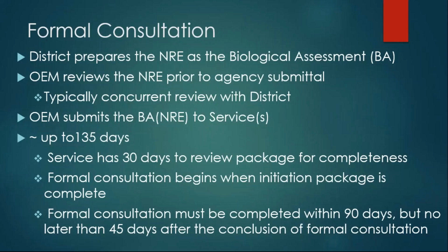OEM also reviews the NRE prior to agency submittal, and then OEM submits the biological assessment, or in DOT language, the NRE, to the services. The services then have up to 135 days to make their final decision, and the details about what happens within those 135 days are on this slide, and you can read that later.